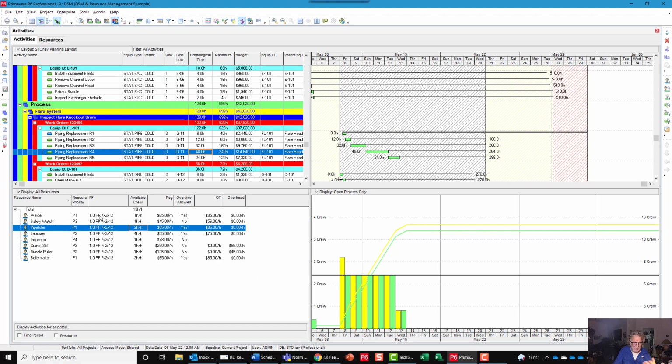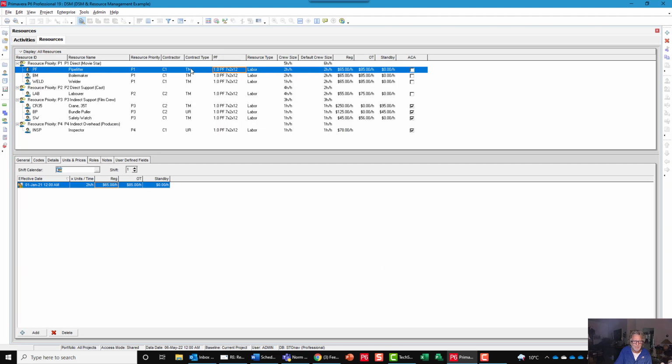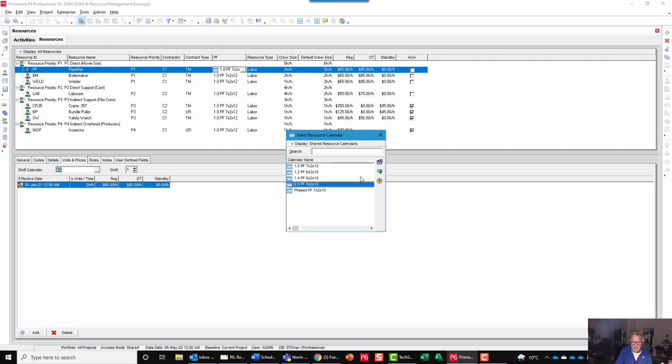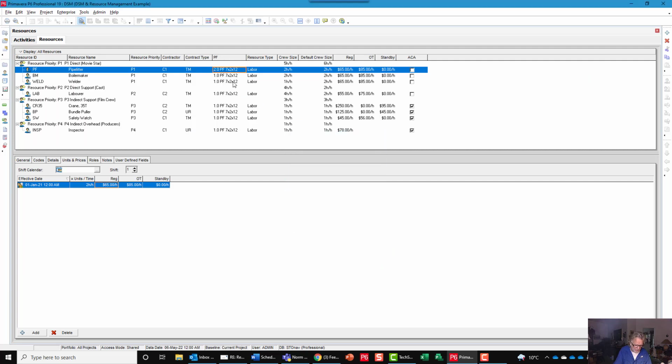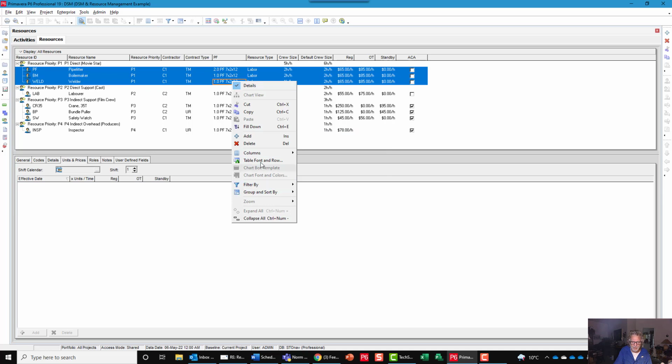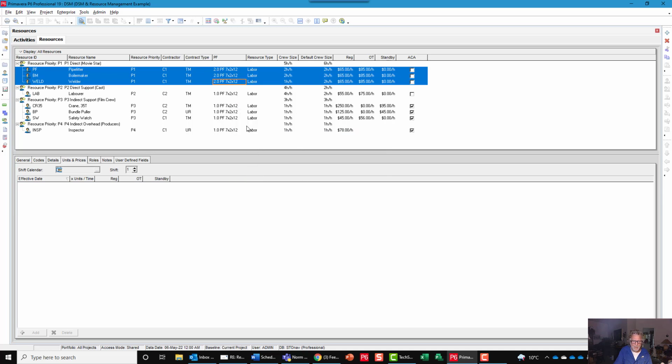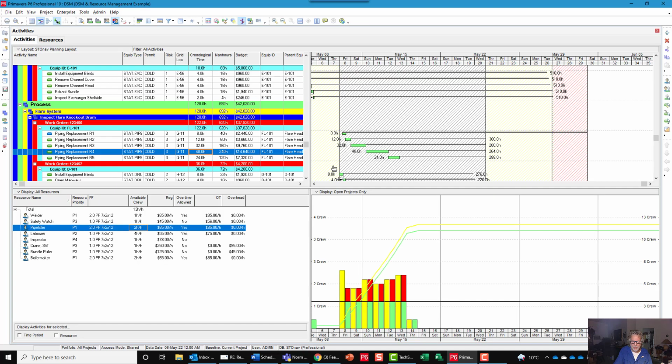But again, I have no productivity factor applied here. This is the assumption people make, that I have a good plan and I have lots of float, because they haven't calculated productivity factor. So let's go back in and change this productivity factor now and say that at a productivity factor of 2, which is fairly realistic when we get into an open phase, for example, we can go back now and re-level this to demonstrate, because now it's showing that, hey, I don't have enough people if my productivity factor changes. I'm automatically over allocated.